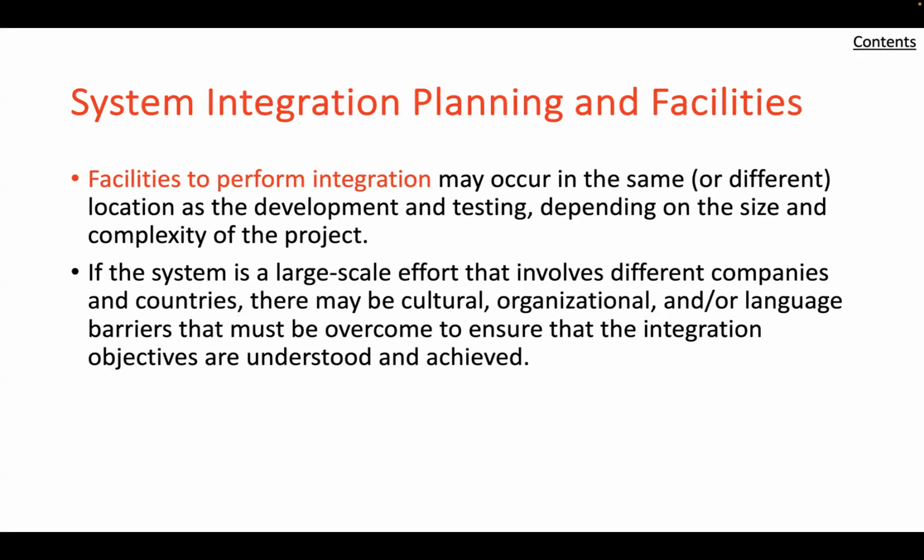The integration process can be thought of as a reverse of partitioning. It is normally accomplished in two stages. One, the individual subsystems are integrated from their components, and two, the subsystems are assembled and integrated into the total system. At intervals during both stages, the assembled elements are tested to determine whether or not they fit and interact together in accordance with expectations.